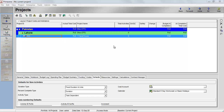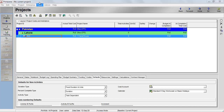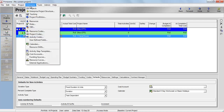This is the first view of Primavera. If you want to define an enterprise project structure, you can ignore or delete whatever is already here — I have a 'one canal house' EPS which I made for myself. Now I'm going to make an RCC Plaza EPS. To define an EPS, go to 'Enterprise' and then click on 'Enterprise Project Structure'.